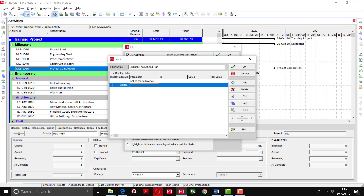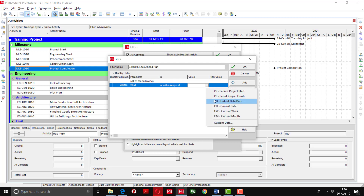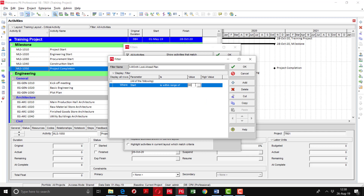Now in this window I will give the parameter: the start of activities is within the range of the data date. You can see different options — project start, project finish, data date, current date, current week, current month. You can also customize the date. Here I will use 'DD', which means data date. In the high value I will write 'DD+3M' — M means month. If I write '3W' it is for weeks; if I put 'D' it means days. So I am writing '3M', meaning three months.